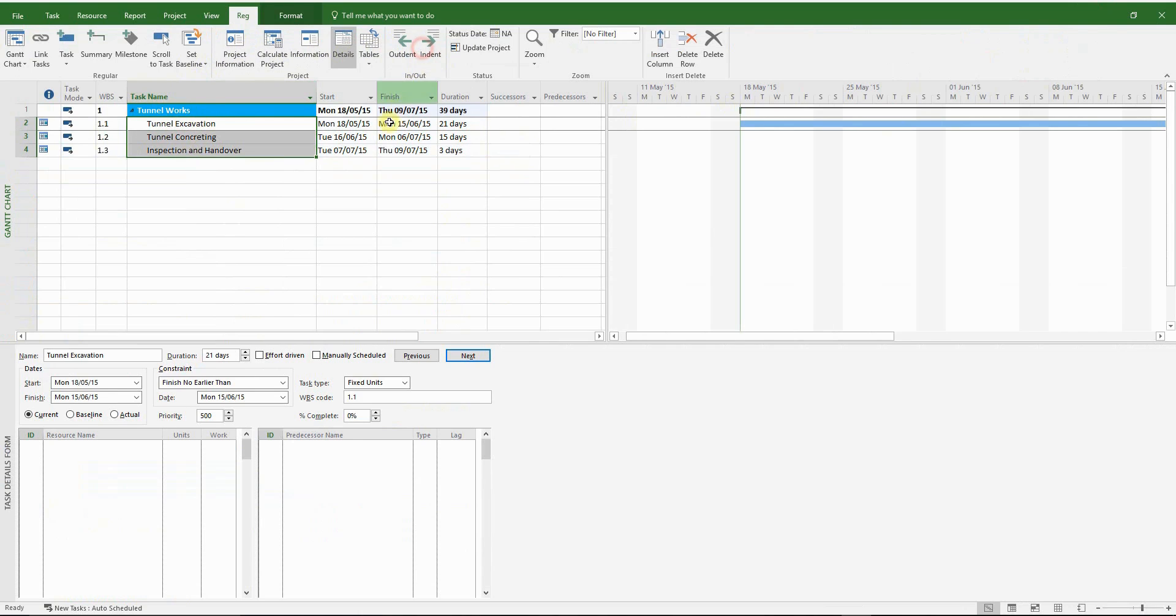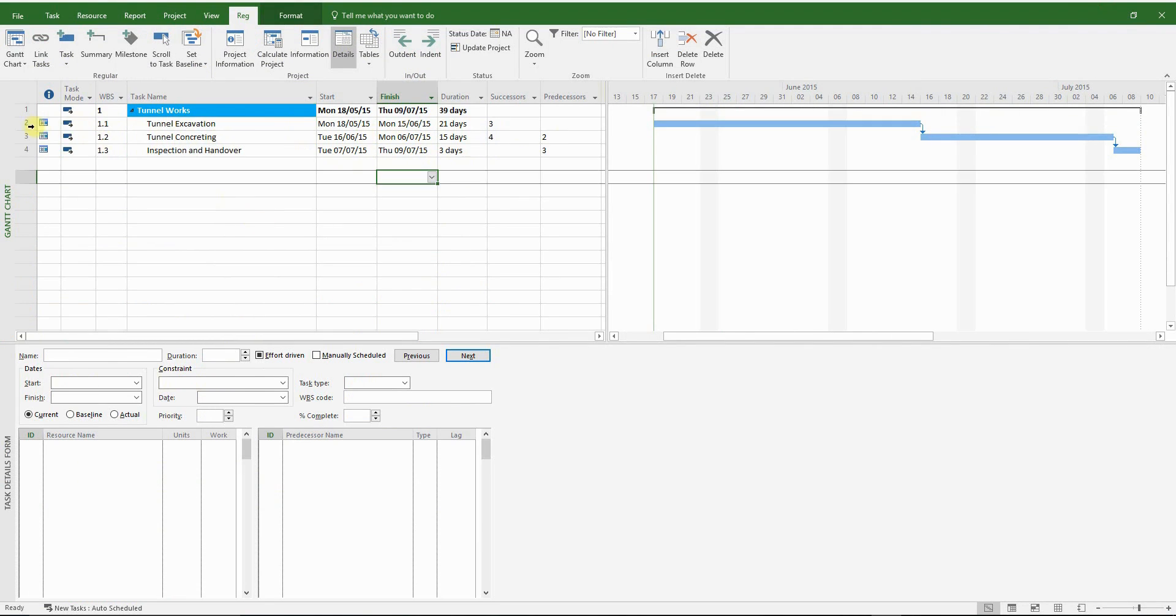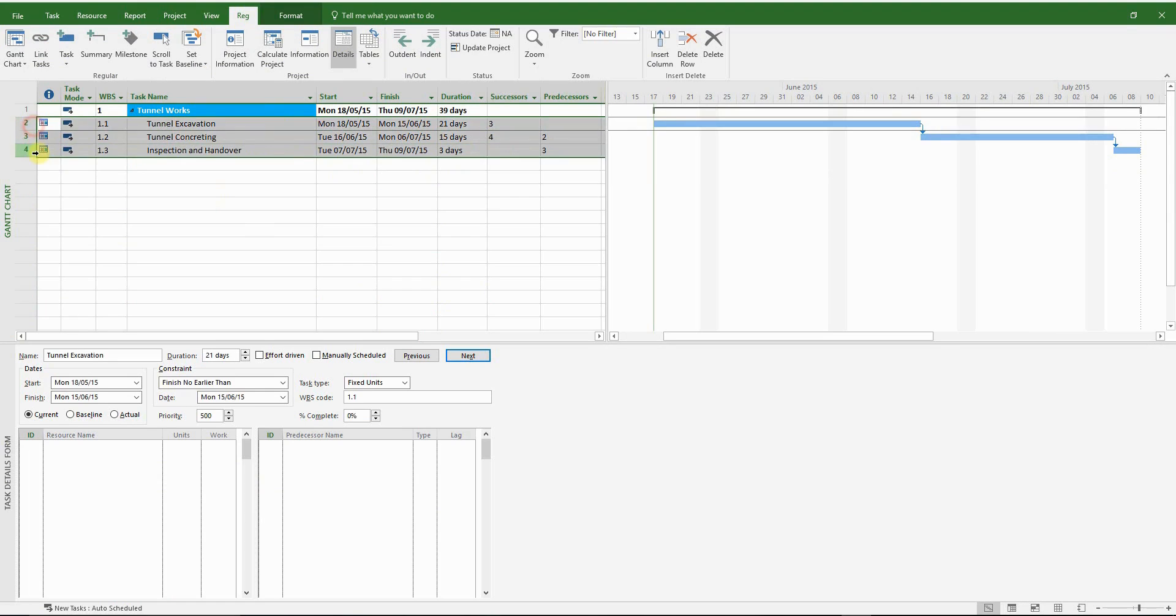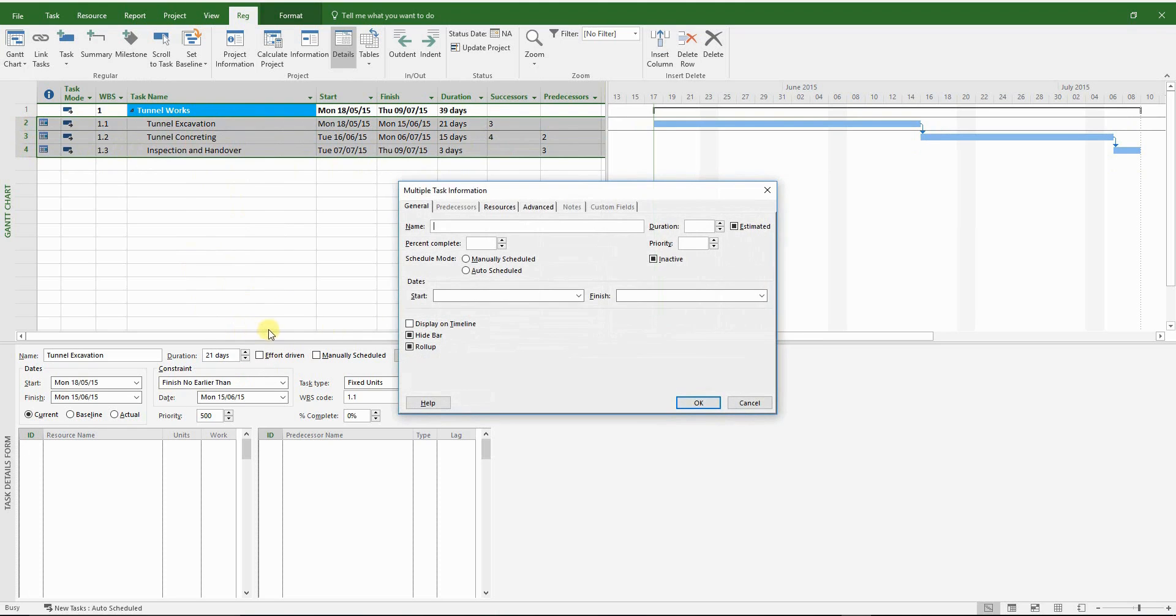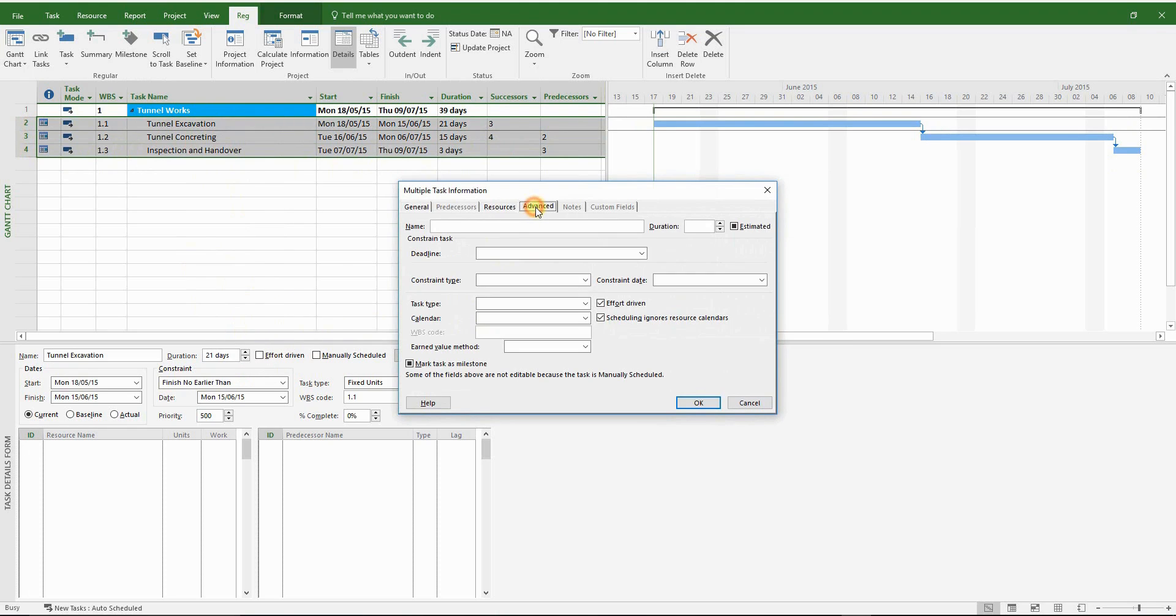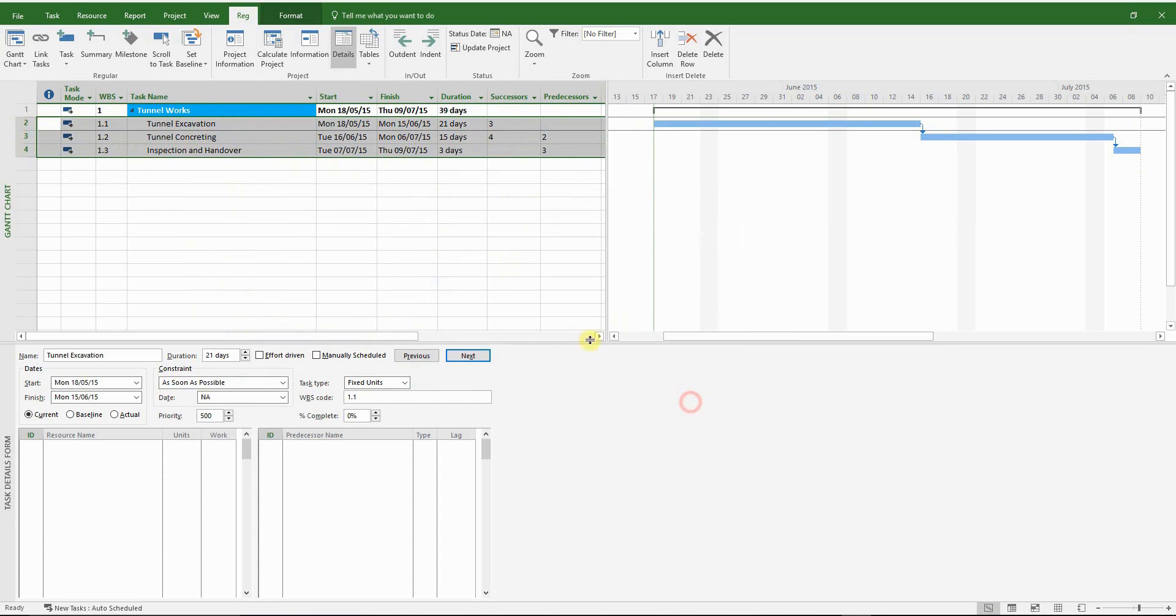I'm going to indent and link all the key activities. Now we have to remove the constraints that have been inserted automatically by MS Project. Change it back to as soon as possible, which is the default setting.